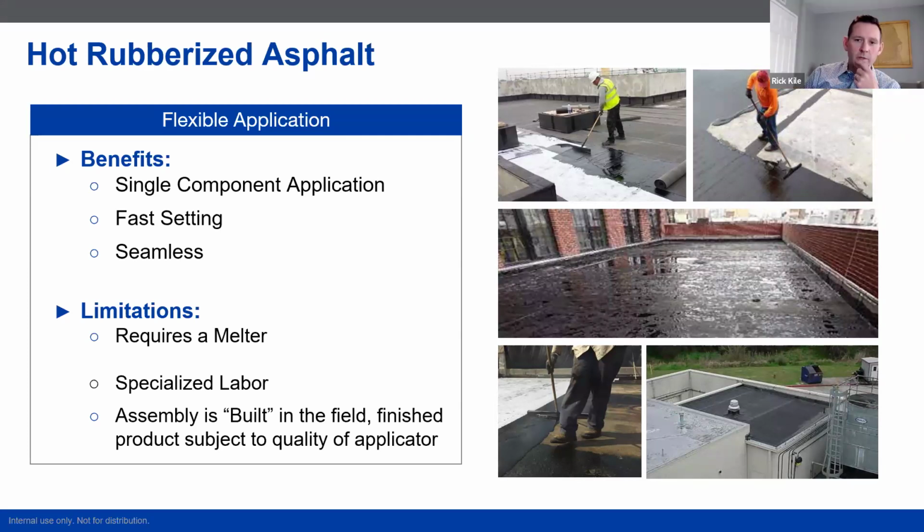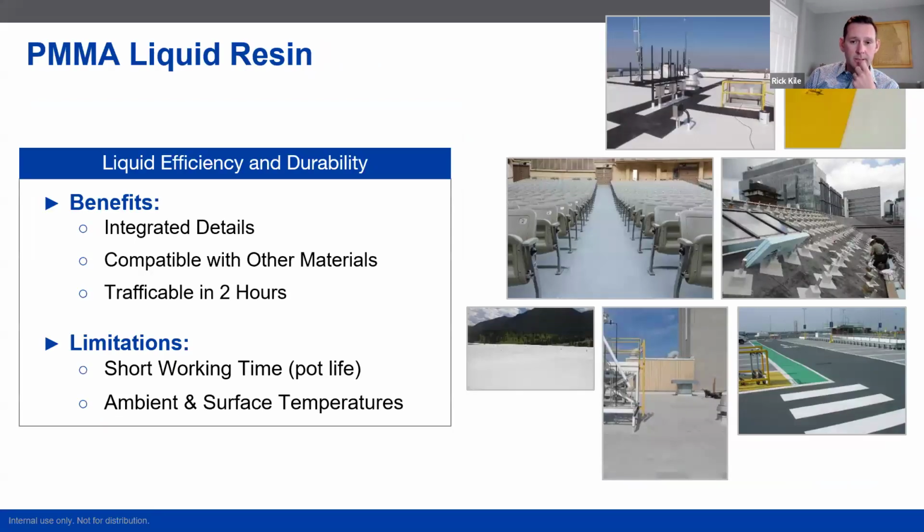Next slide. What's the typical exposure time for an HRA? I mean, it's going to depend on the cover board, but usually you're looking at around a month. Okay. So something to keep in mind in sequencing, which we'll also talk about later.